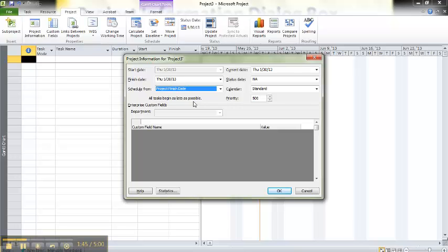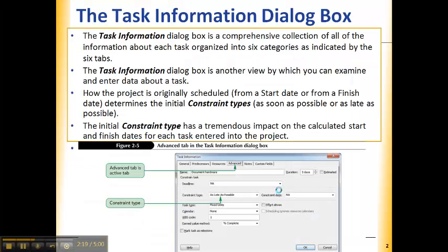Does that make sense? Another example, since we're all students here, is maybe you have a project that's due in the middle of July. So are you the type that gets started right away? Then you're going to schedule from the start date. If you're the type like I am that says, okay, it's due the middle of July, it's going to take me a week to get the writing done. Before that, I got another week to get the research done. So I need to start by this time in June. So that would be scheduling from the finish date.